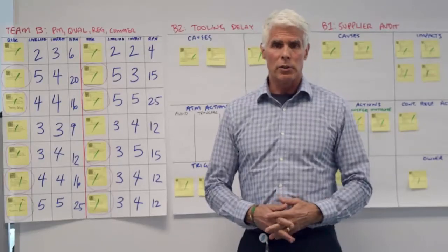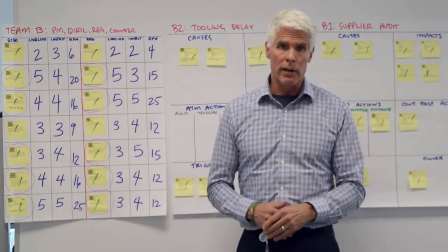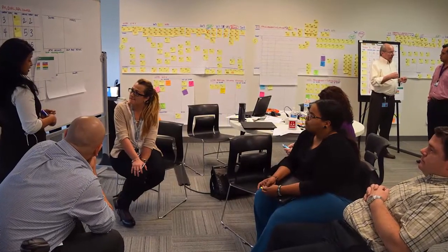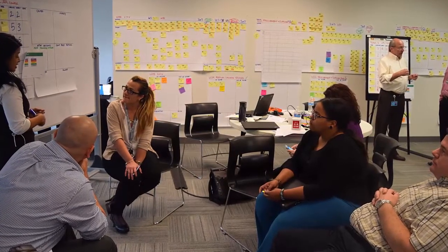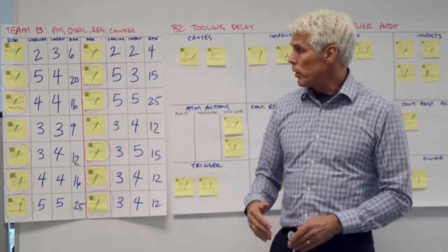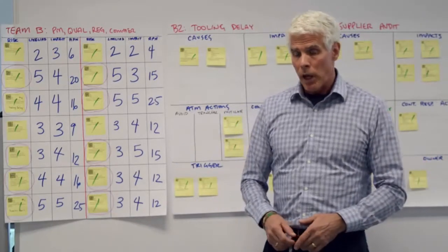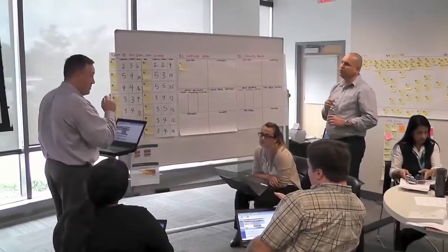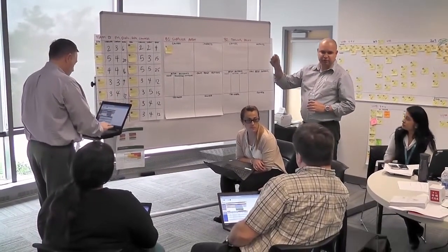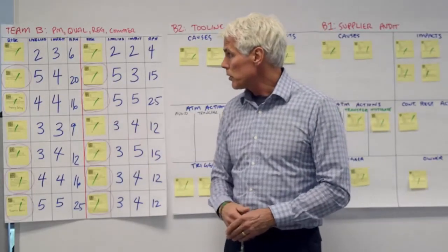Throughout the planning session, we capture risks. Once we get into the 3rd day of the planning session, risks have become readily apparent to us because we've spent so much time identifying scope, creating schedule, and so on. So what we do is we take the risks that have been identified during the planning session and we form teams. Each team takes a set of those risks, and the first step is to do an assessment. This is a standard risk assessment.